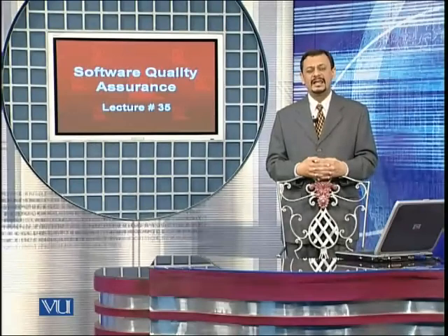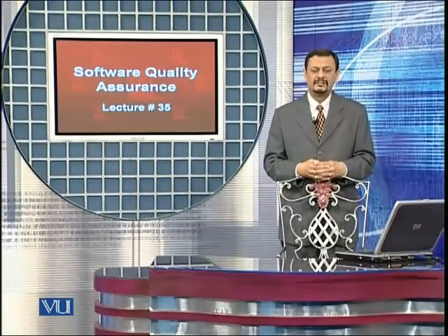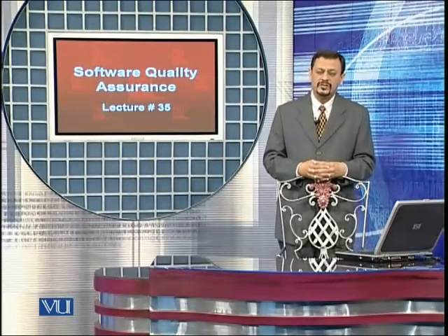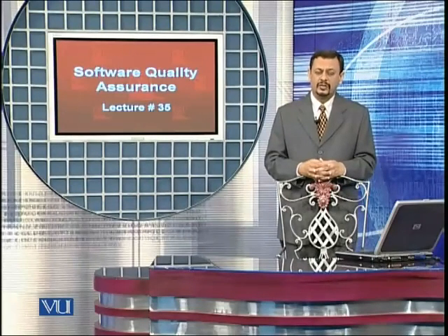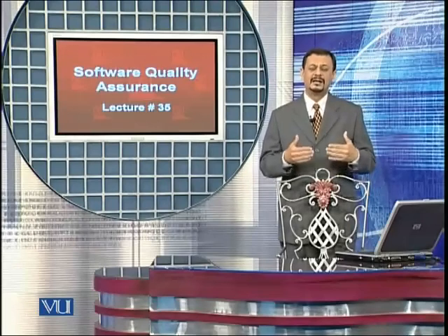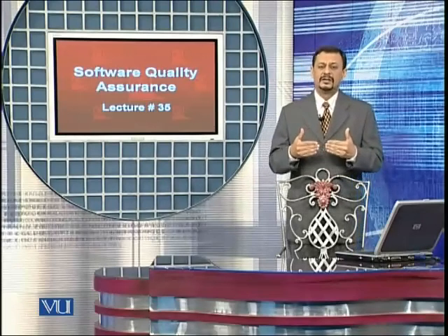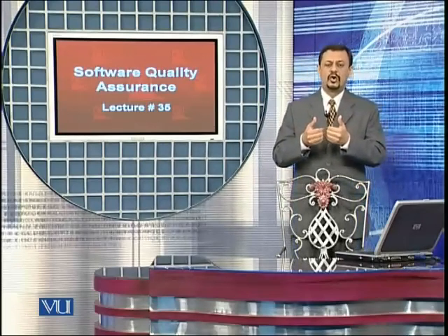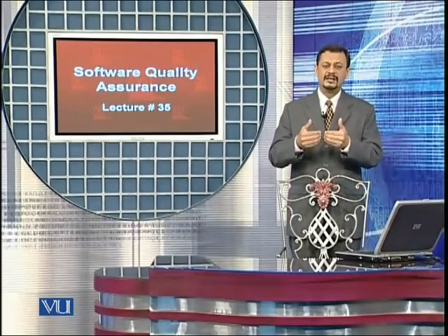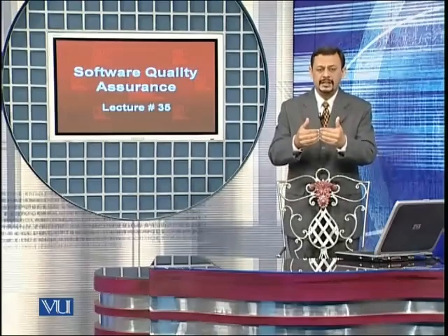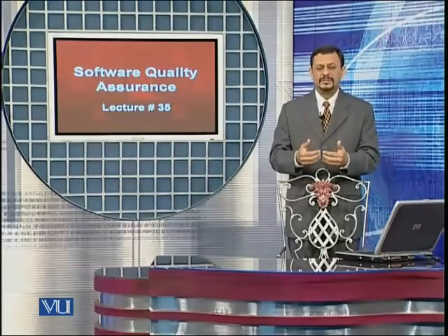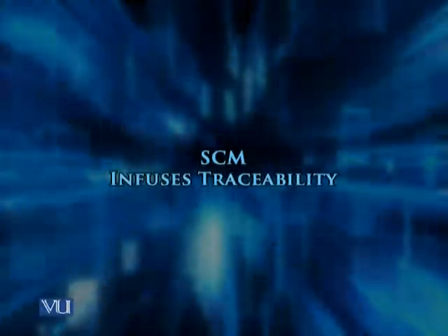Any approval that is given to the change requests must be done on technical merit. And that technical merit links or traces the changes and new approved configuration items to the requirements. So we see that SCM infuses traceability.